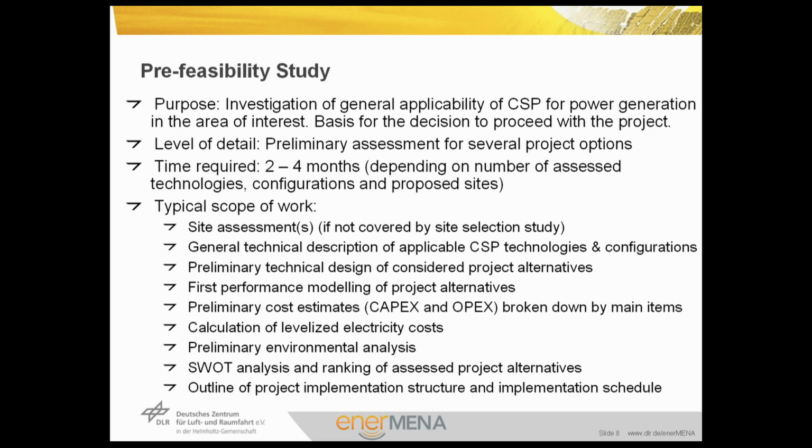Here, a socio-economic study should also be performed to some extent to indicate the changes the power plant would make, for example, to create more jobs, since it is labor-intensive, and more related topics. A SWOT analysis, strengths, weaknesses, opportunities, and threats, should be carried out in order to indicate how attractive the project alternative is. And finally, outlining the project implementation structure and implementation schedule is important. Time for such a project means money, and in their turn, the lenders and shareholders want to ensure that the time for executing the project is short.